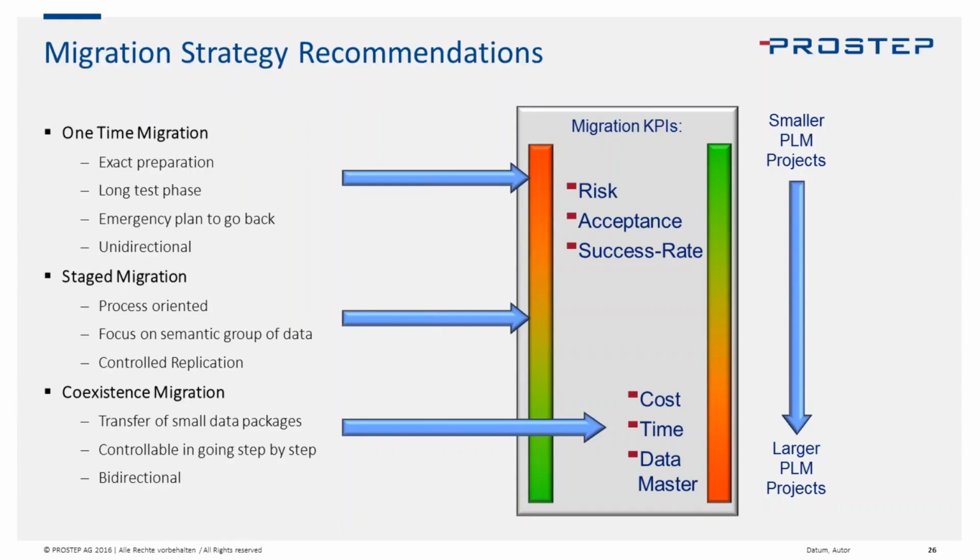Yeah, and it lends itself well to a smaller PLM project because frankly it costs less, and it's easy to get the data in. What we have in the middle, the staged migration, is maybe somewhere between a delta update or a package transfer of some of the data, and that kind of bridges the gap where you can separate those a little bit more, and limit some of those risks that come along with that migration and that acceptance.